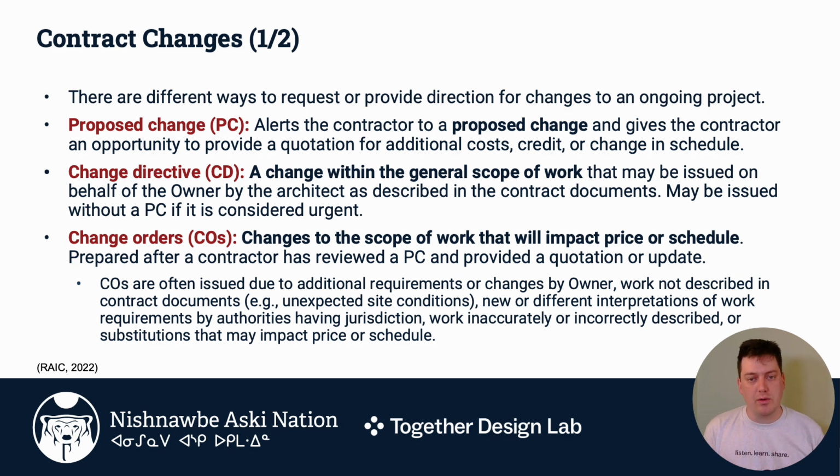The second is a change directive. It's usually within, or it needs to be within, the general scope of the work, but for some reason requires faster action. And so you mandate the change without the back and forth that comes with a proposed change. The risk here is that without understanding the cost or the time that the change directive is going to take, you could have significant impact on the project, but this is the contract change that moves the most quickly.